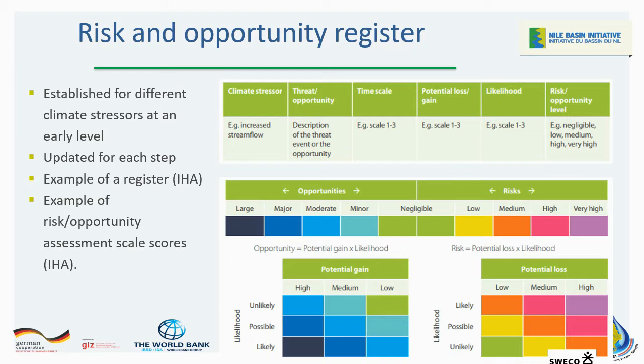For example, if it's a dam, one may decide not to build a very wide spillway to handle a particular flood, but decide to monitor changes in climate data, and at some point in future maybe review the construction, or maybe just choose a site where it's possible to build in an extra spillway. So it's very important that stakeholders are involved.